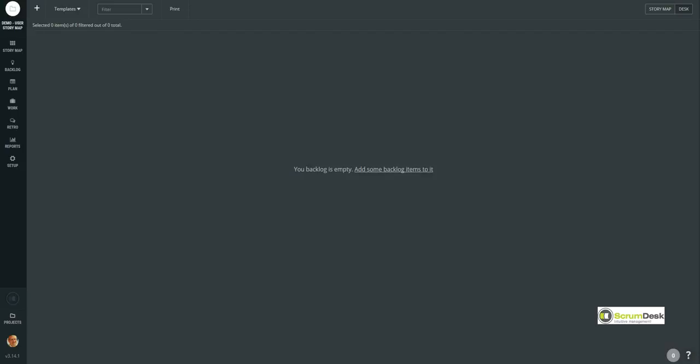One of the techniques is called user story mapping, and it has been developed by Jeff Patton, which is a great form of requirements organization. It offers the possibility to break down large requirements, epics, into smaller user stories. It also supports the possibility to order user stories in such an epic and to set up priorities this way. It is even possible to plan multiple releases and sprints at the same time. Because of the usability of this technique, we decided to include it in ScrumDesk Start.